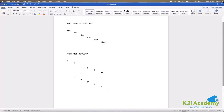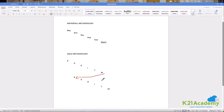By doing the same process in iterations, at the end of each iteration the client is able to see the result after at least four weeks. If the client is not satisfied or needs any change, I can take that change immediately and pass it to the next iteration, and after the next four weeks I can show the updated result. The client and the company are always connected, and feedback loops are always happening so the end customer is satisfied with the work being done.